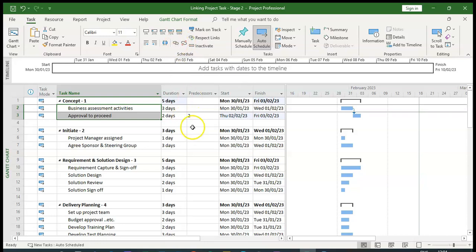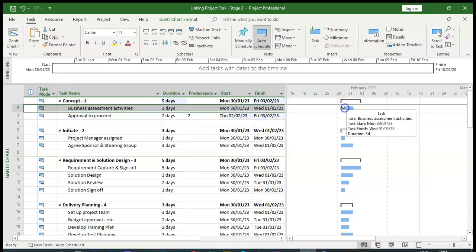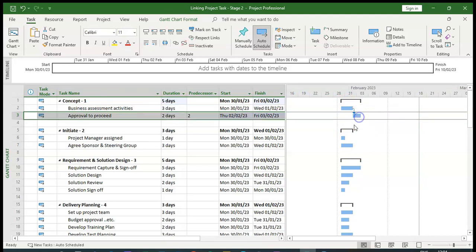Now straight away what you would see on the right hand side, you see a Gantt chart is starting to develop here. So if you hover, you can see one task here with this little bar with the second task. And if you hover over this link with the arrow on it, it gives you a brief description of what that relationship is. So it's a finish to start task. And what that is saying is the first task must finish before the second task starts.